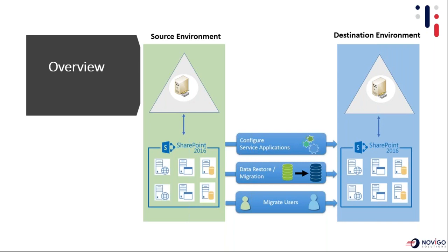At a high level, this involves the following steps. Back up all your content databases and configurations. This is the next step and must not be taken lightly. Back up every single detail of your SharePoint farm, including configuration settings, databases, farm configuration, custom solutions, web.config modifications, etc.